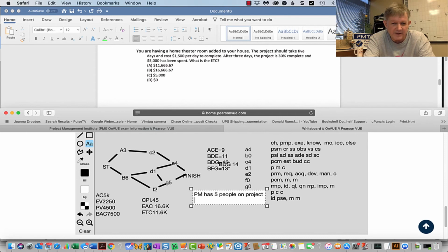So what I would do, I'd come in here, well, PM has 5, so if it were number of channels, if that's what I was asked, I could go, well, PM and 5 is 6, so 6 times 5. I'm going to not get too sexy with brackets here. Yeah, I should have brackets around that, and I know some of you are going, well, you have to have it around the 6 times 5, because if not, it's going to mess up the formula. I know the brackets should be there. So 6 times 5 is 30, divided by 2, that gets me 15 channels. Look at that. And we still got a lot of space left over.